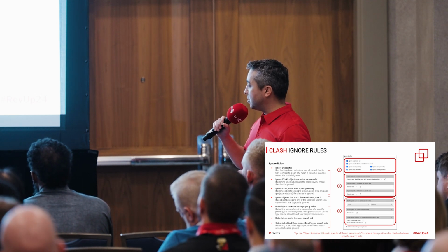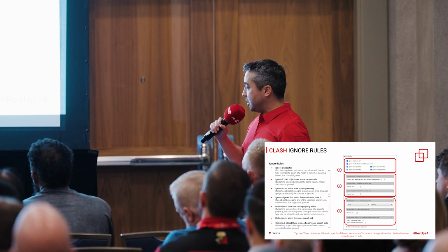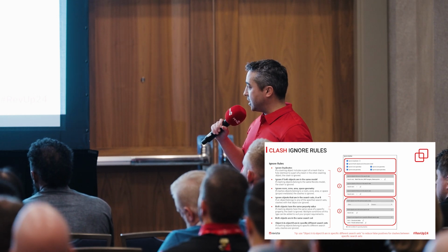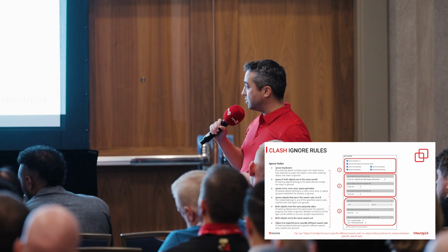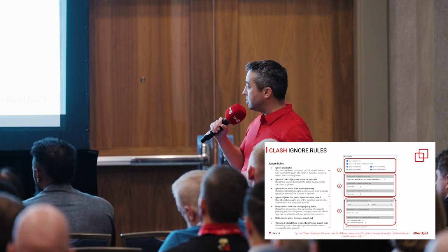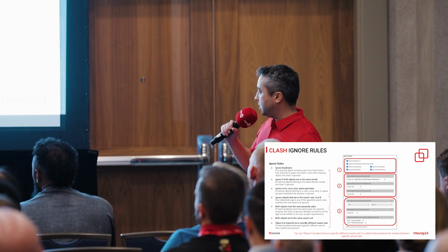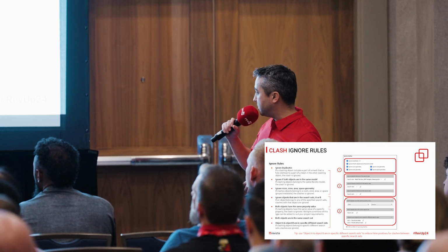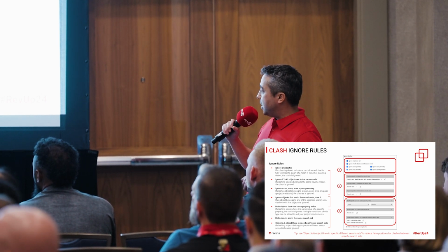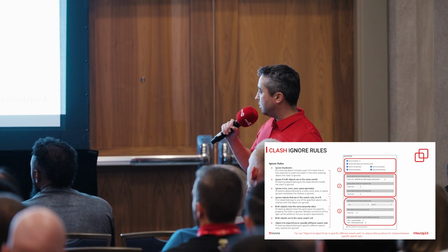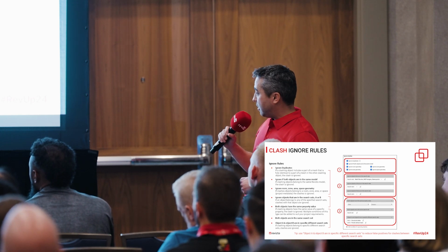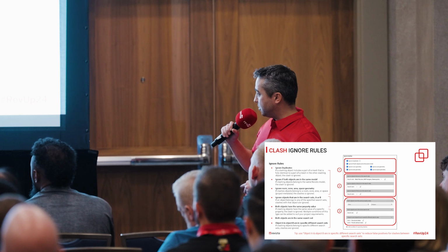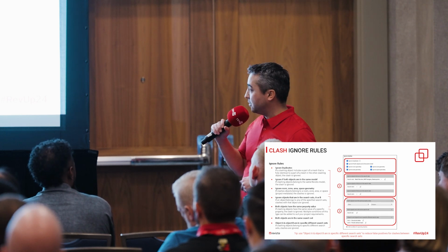On a type 1 construction project, you're going to always have plumbing and mechanical risers rising right through the slab, and that would get caught as a clash. But you can actually tell Revizto that if you have these two specific search sets that are clashing, I want you to ignore that. And so that one's called right here, object A and object B, that are in specific different search sets. And you can add even more conditions if you want. Obviously, the vertical risers here in this example are going to get sleeves in the field, so we don't want to detect that.